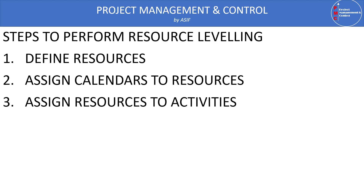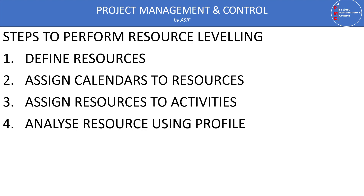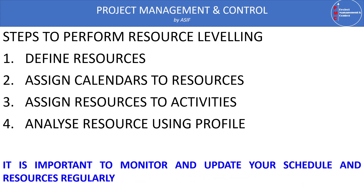After defining resources and assigning calendars, assign these resources to all activities. You can then create an S-curve or view the total resource requirement of the project using the resource usage profile. It is important to monitor and update your schedule and resources regularly to avoid over-allocation or any delay due to unavailability of required resources.